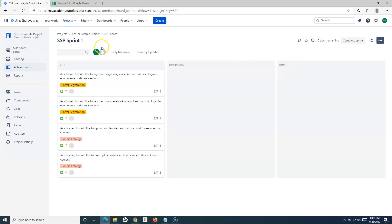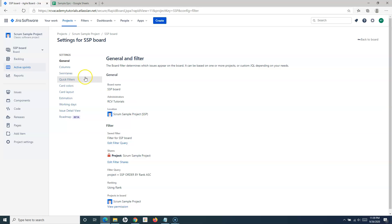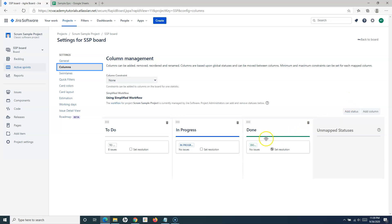This board has three columns: To Do, In Progress, and Done. These columns are mapped to the underlying workflow. In Jira, a workflow is the process that issues follow from start to finish, and the workflow has certain statuses that get mapped to the columns on the board. To see that detail, go to board settings and then Columns — you'll see the statuses To Do, In Progress, and Done coming from the workflow.